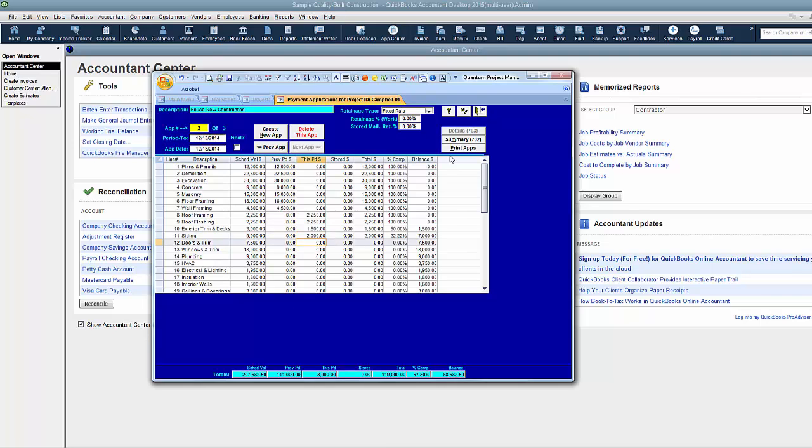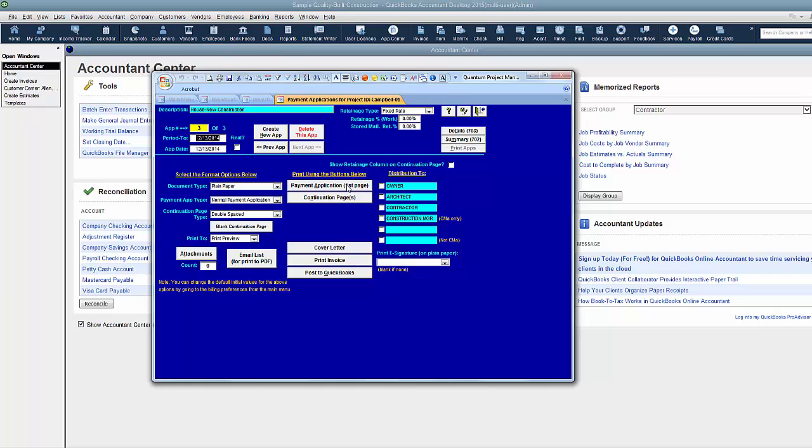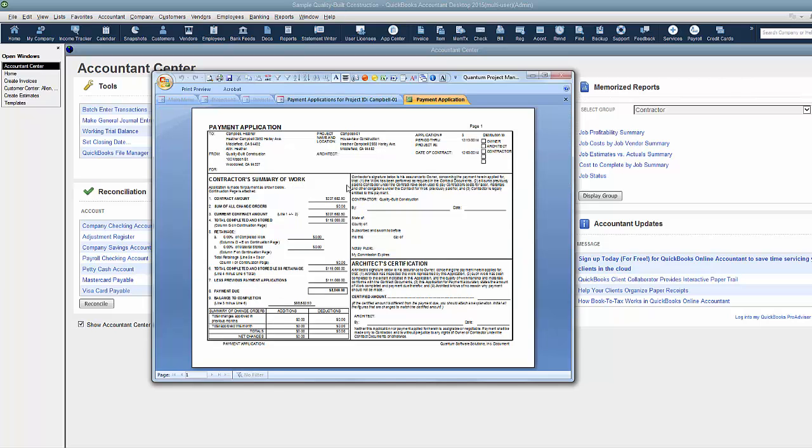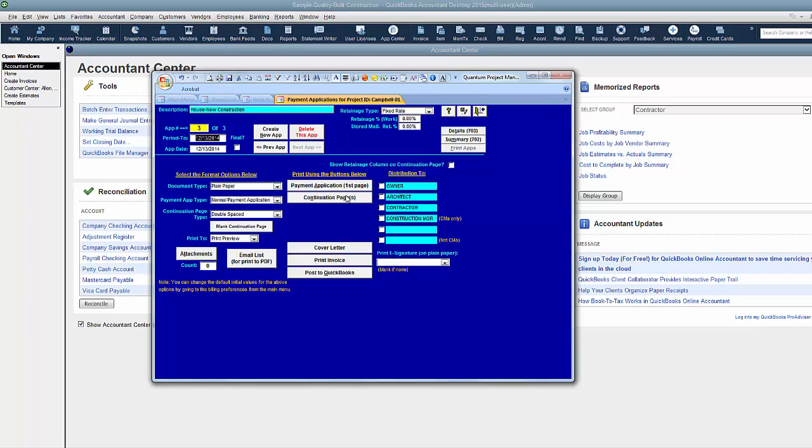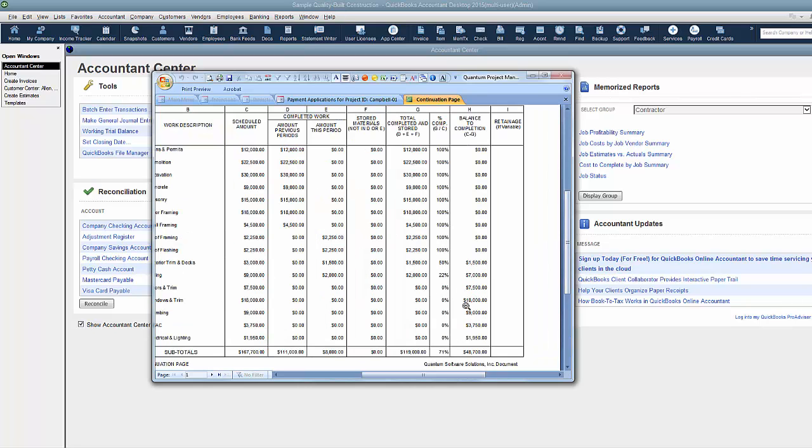So, now I can come in and print my application and turn to the AIA format. You've got your payment application cover screen as well as the detail behind it and you can print each of those. So, let's pull up the payment application and see what it looks like. And as you can see, this is the AIA format payment application. And then, if you wanted to go back, we can look at the continuation pages and you get all of that detail that most contractors are looking for. We've got our schedule amount, our original amount on the schedule. We've got any previous payments, the amounts that are going to be for this period, our percentage complete, and the balance to completion.